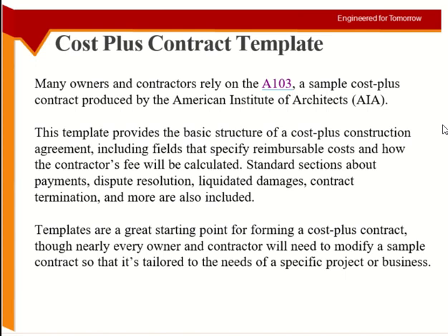And at what point will the contract be terminated, at what clause, or what thing will cause the contract to terminate? One of the clauses is, if the project is complete, the contract is finished, right? Okay, this is one of the clauses. But there are other clauses as well which can make the contract terminated, because these parties can no longer work with each other. For example, there could be a clause that if any of the parties go to court, the contract is terminated, because now the matter is in court. We cannot hold this agreement now. Whatever the court decides, we will see. So there can be other clauses as well.